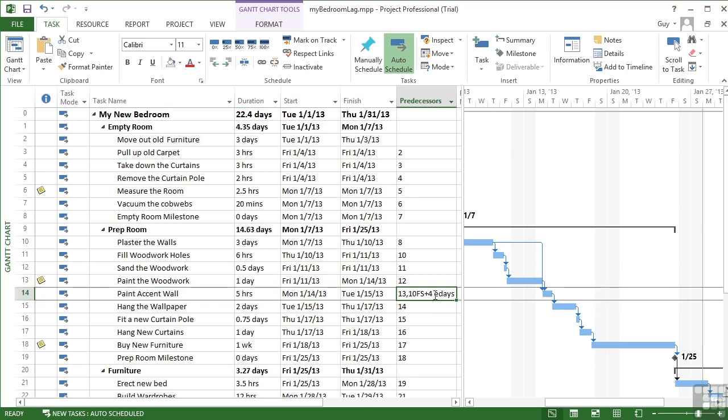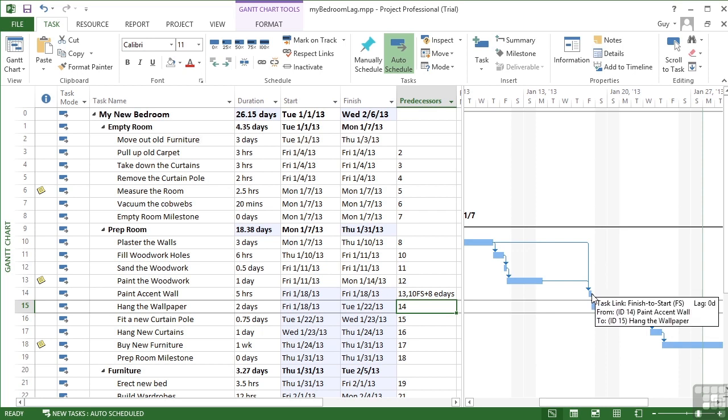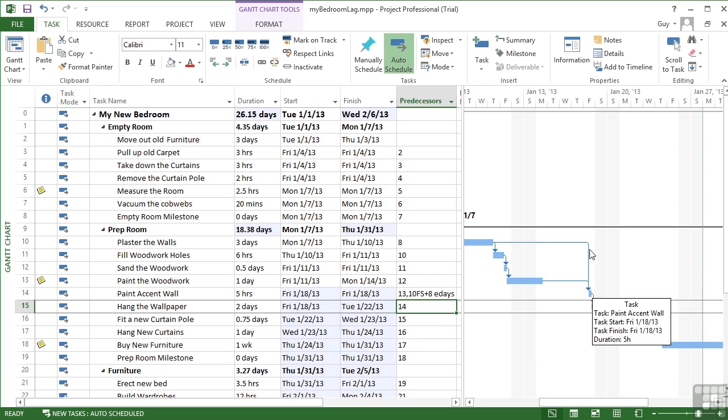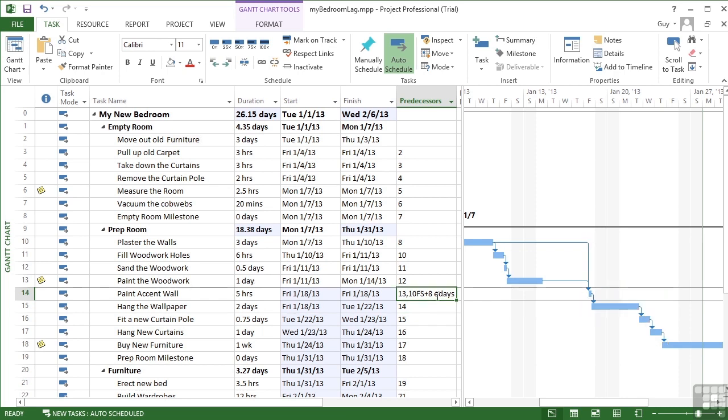If we said the plaster really needed a lot longer, let's really swing this out so we can click into here and edit that four. And let's make it an eight just for exaggeration. You can see that then has a knock on effect. Although this task here paint the woodwork is not knocking on paint the accent wall having to allow eight days for the plaster to dry here, even though it's elapsed day. So it's actual time passing rather than working days that then knocks on this task. So I'll take that back to the proper four days. We're going to allow four days and that's it.